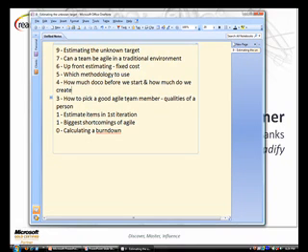So we've prioritised them, we size them up. So estimating the unknown target, we might say, is 5 points. Where a point is unitless, doesn't really matter, it's just an indicator. And then all the other questions are relative to that. One of the mistakes you'll find a lot of teams make is to estimate in ideal days, or they just talk about, well, this item will take 3 days to do, this will take 12 days, this will take 2 days, all that sort of stuff. And they're thinking in their head, that's if I had 8 hours a day and I didn't have any interruptions and I didn't have any hiccups or anything like that.